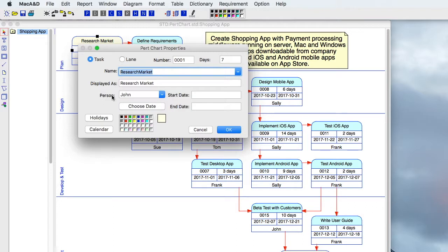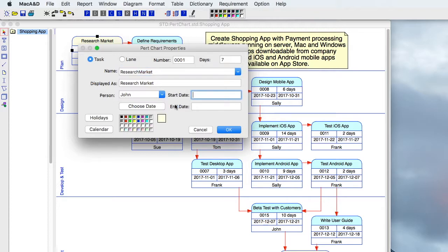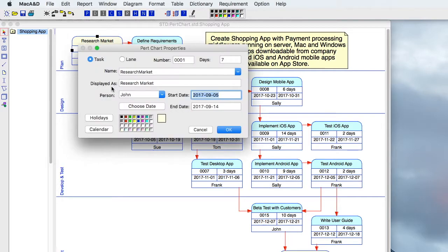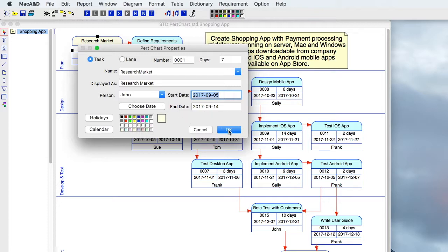Finally, once you've identified all the tasks and the relationships and kind of scoped out how much work is involved, you'll need to schedule that and you'll do that by selecting a start date. You can use a calendar for that. So in this case, we're going to start this task on September 5th. It automatically assigns an end date, taking into consideration the holidays, vacations, and weekends and stuff like that for the specific person that it's assigned to.